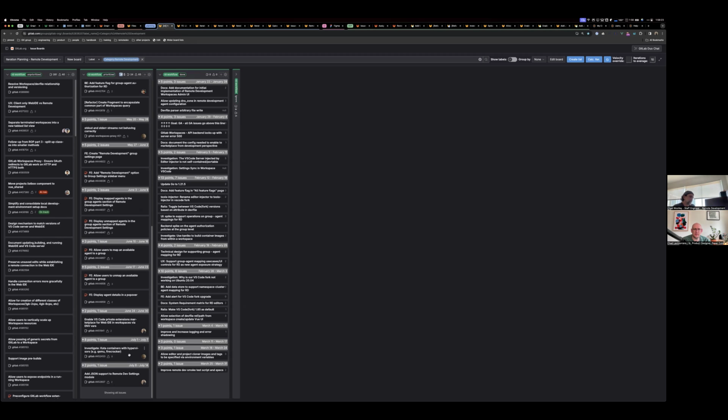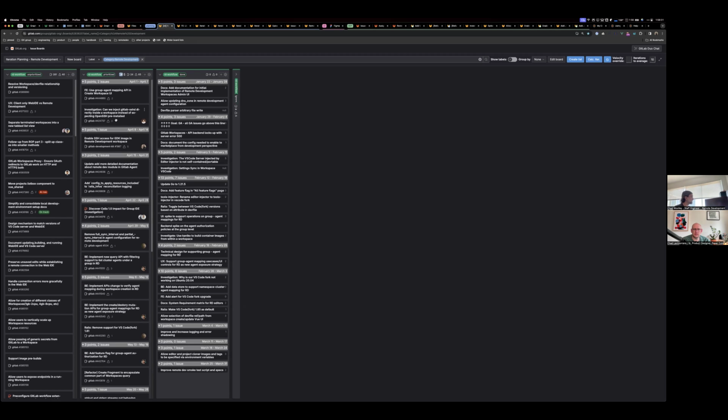Prior to that, the PM would run them. Sometimes I would run them. It really doesn't matter. It's really just a facilitator role, because you're going down, okay, everything here that's not estimated, we're going to discuss it, make sure nobody has any questions or blockers, and then we're going to estimate it and then move on to the next one. No more than 5 minutes. If you have to talk about it more than 5 minutes, then it probably hasn't been refined adequately, and we kick it back out for further refinement.